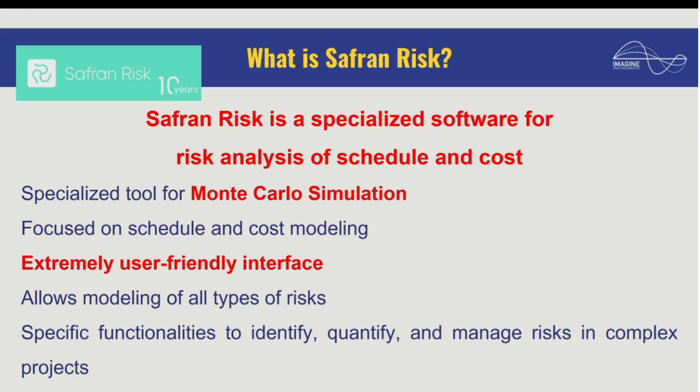Maybe if it rains when you're doing something, that task will be delayed by 1 or 2 days. But the other task that comes right after won't be delayed. It will start delayed, but the duration itself will not increase because it rained last week, right?